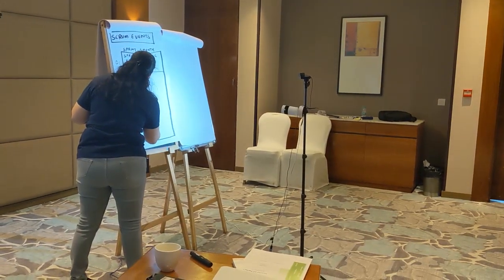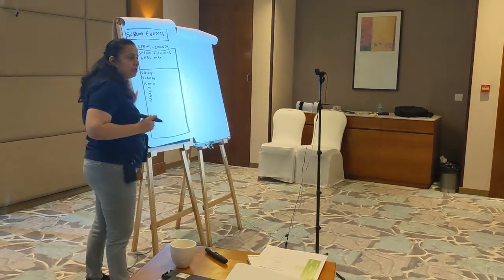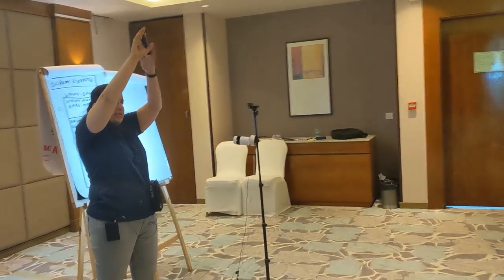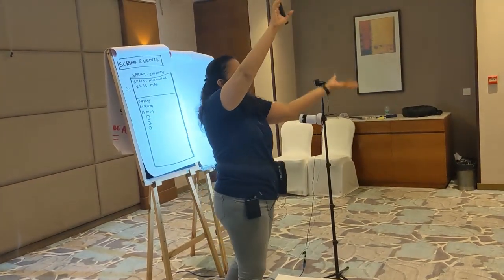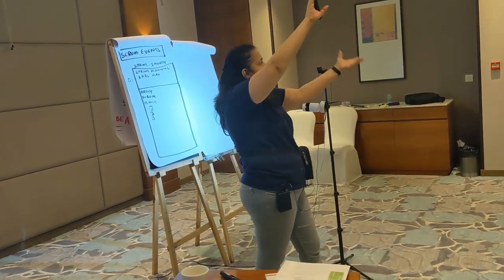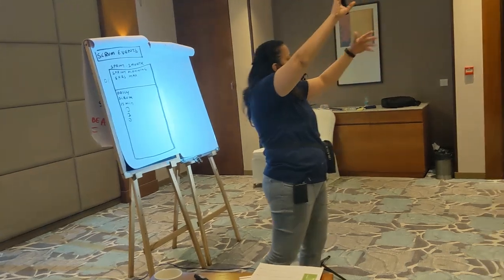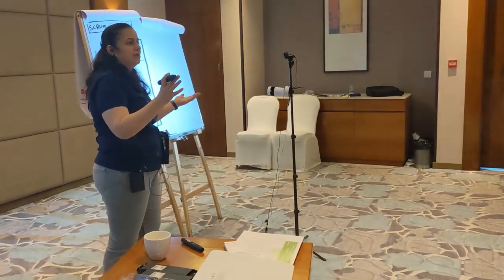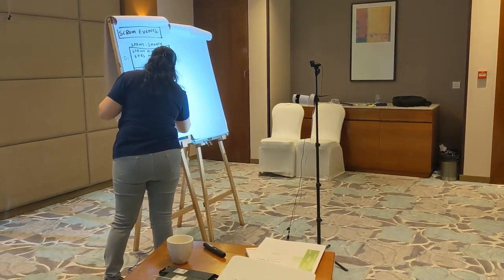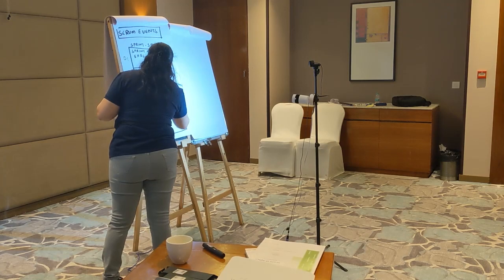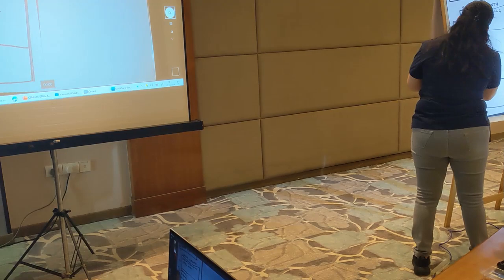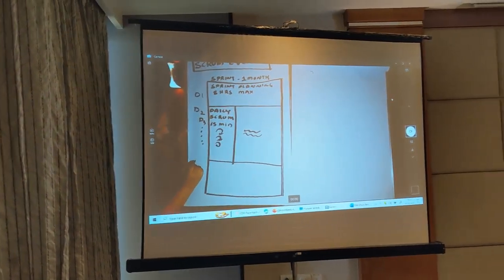So that's the sequence. The purpose is so that we can check the progress towards our sprint goal. In sprint planning, we had decided a sprint goal. So we see, are we on track to meet the sprint goal or are we going to miss our goal for the sprint? If we are not on track, is there some course correction we can do? Do we need some help? Get changes. So daily Scrum which happens every day. Now of course people will work here. And then comes here, this happens a lot of days and then comes the last day of the sprint.